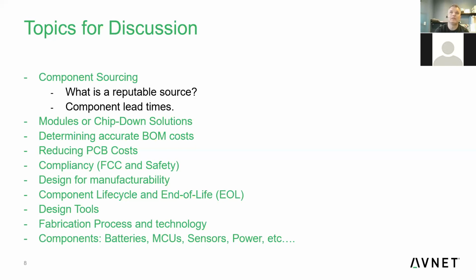So it's something you really need to stay on top of, and on a regular basis you should be getting your BOMs quoted, so that you're able to get visibility of these lead times. And of course, this is mostly important as you start to move into a production scenario, right? If you're building hundreds, then typically you're probably going to find it in inventory. But if you're building thousands, it's unlikely you're going to find it in inventory.